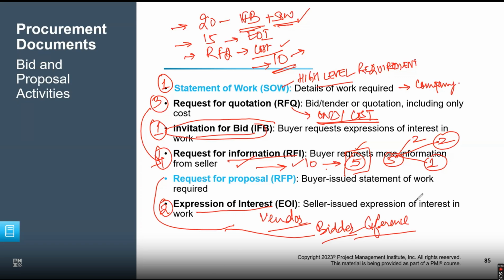The purpose of having a bidder conference is to ensure transparency. It should not happen that I favored one of my favorite vendors or that this guy is one of my relatives. The bidder conference is meant to make sure nobody gets any information before or after. Everyone gets common standard information in one go. All vendors get an equal opportunity to understand, to ask questions, and to counter-question.